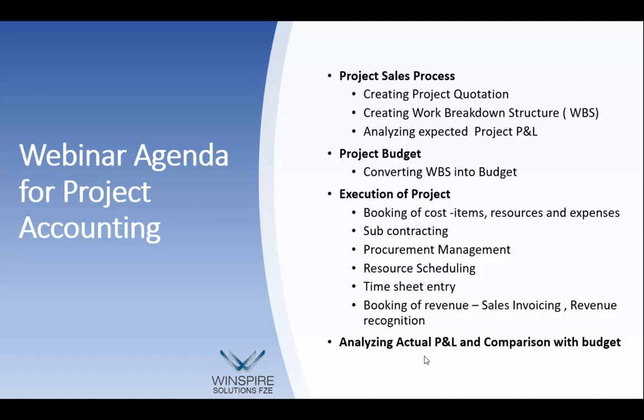And for these independent vendors also, you can do the resource booking, as if they are available full time for you to do the job. For example, you might outsource a particular job to an individual, and this individual can be a part of your resources for this particular project. Once we do the scheduling, there is a nice calendaring, so that you don't do mismatching of the schedule. If one person is already booked for Jan, you cannot double book him for Jan again.